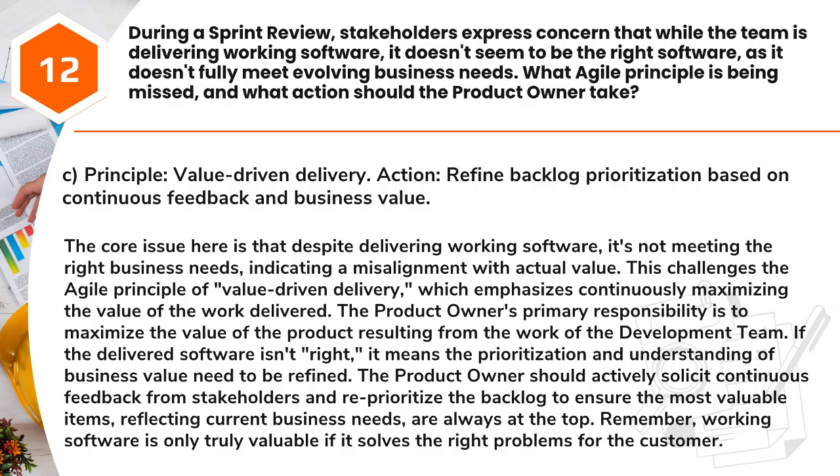If the delivered software isn't right, it means the prioritization and understanding of business value need to be refined. The product owner should actively solicit continuous feedback from stakeholders and reprioritize the backlog to ensure the most valuable items, reflecting current business needs, are always at the top. Remember, working software is only truly valuable if it solves the right problems for the customer.